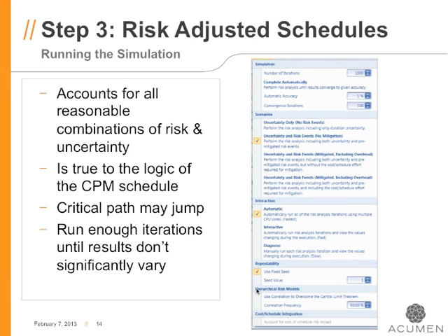other out. So if you have 2 children activities within a summary, and the first child activity is a very aggressive estimate and the second child activity is a very conservative estimate, then those 2 competing activities potentially cancel each other out. And so as you roll up the results through the WBS or the summary, you lose the true impact of risk. Again, we've made it super easy to avoid this issue, known as the central limit theorem, or the issue with hierarchical risk models. Behind the scenes, through the use of correlation, Acumen Risk will take care of all of that.